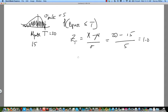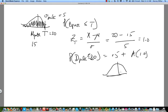And I don't quite remember the area under the curve, but certainly what we would end up doing is that p duration of the path less than or equal to 20 would then be 0.5 plus whatever the area is associated with 1.0 under the curve. If you have a cumulative table, then you just look at 1.0. But if you have the table where we only get from the table the area between 0 and z, then of course it makes sense that you would have to add this 50% right here, which is what I've just done.